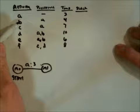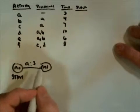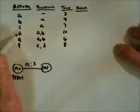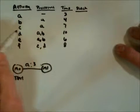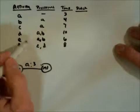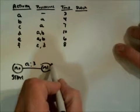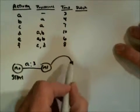And here's Milestone number 1. Now, according to my table, both B and C come out of A. And I'm looking ahead a little bit. It looks like D and E both come out of AB, which means that A and B both must be done before you can start D, same with E, which lends itself to this kind of a picture.